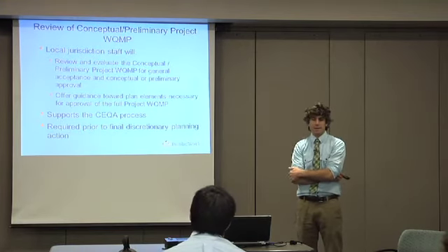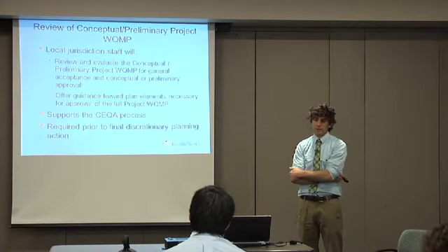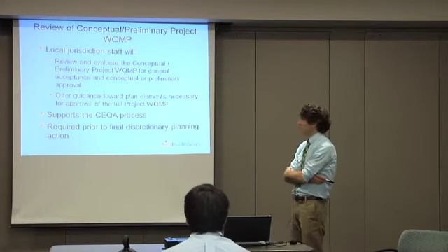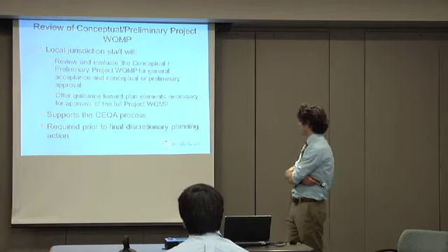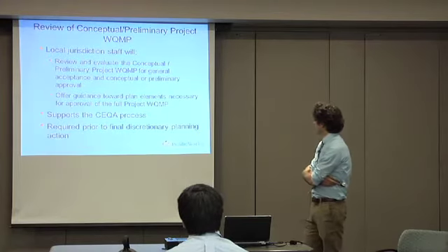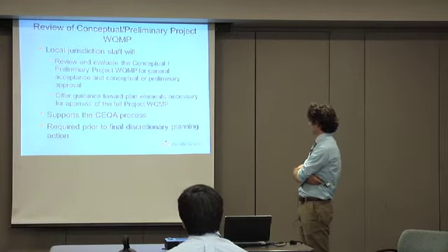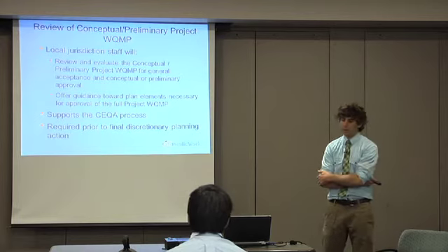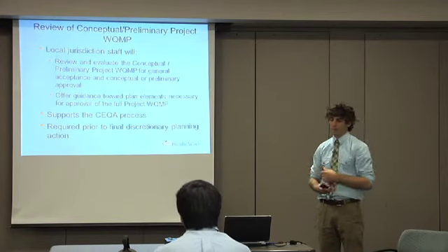Maybe that's the kind of detail that doesn't need to necessarily show up on a conceptual WQMP for some types of projects, but you want to make sure that they will end up doing that as part of their full project WQMP. So this is your opportunity to put conditions on the project, to offer suggestions for how they change. This is typically in support of either a CEQA process for a significant project or some other form of discretionary planning approval.